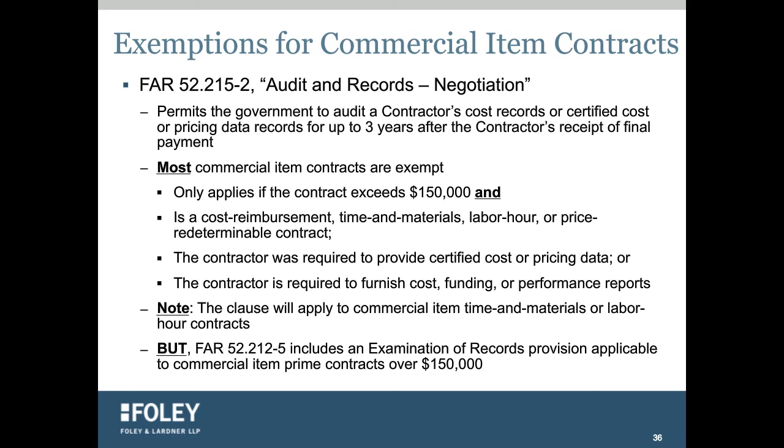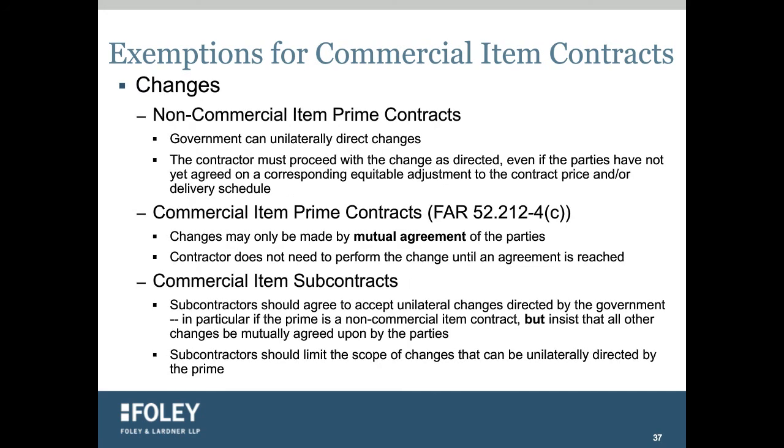Changes. We heard Marshall talk a lot about the government being able to unilaterally make changes. Guess what? Commercial item prime contracts, they don't. All changes need to be mutually agreed upon between the parties.